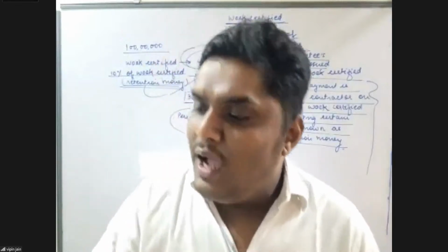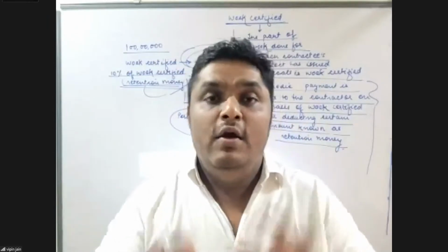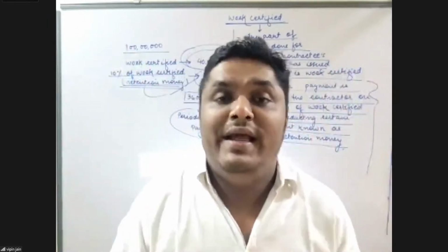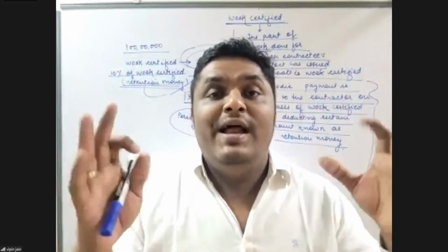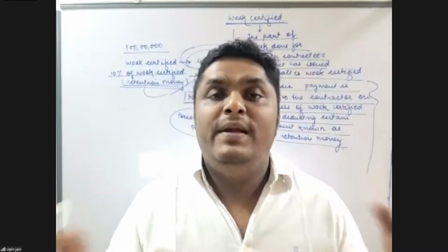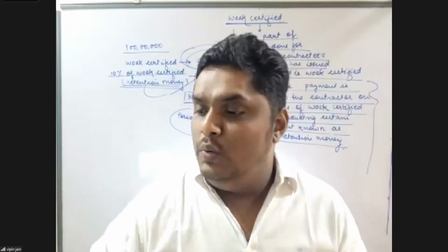Sudhanshu Shekhar sir, how is periodic payment calculated? From work certified, you have to deduct the retention money. We will get the periodic payment. Further, how much is the percentage of retention, how much is the retained money, will be given in the question. Don't worry.